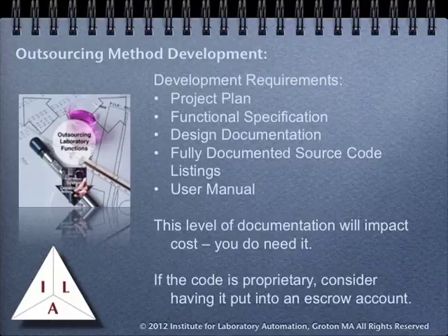You have to have enough documentation so that someone can come to the project and figure out what has to be done, and how to make changes that might be required. User manuals are needed to train people new to the system, or to answer questions about the system's operations. You can't always assume that the vendor will be there to support you. Documentation is one thing developers really don't like to do, but until the paperwork is complete, the project isn't finished. Thorough documentation can impact the cost of the project, but will save you money in the long run.